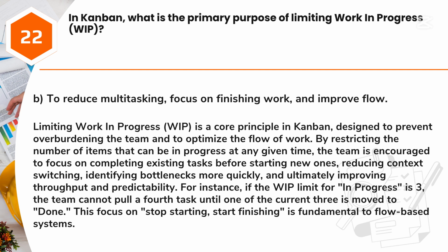For instance, if the WIP limit for in progress is 3, the team cannot pull a fourth task until one of the current 3 is moved to done. This focus on stop starting, start finishing is fundamental to flow-based systems.